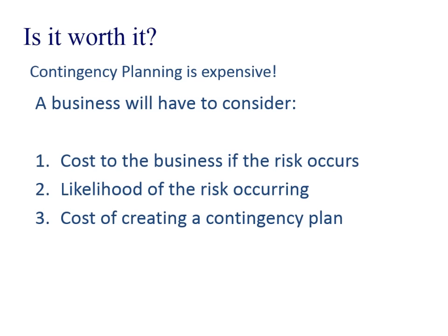So one thing that you have to think about is, is it worth it? A contingency plan is going to be expensive to put together, and it's going to be time consuming. So think about, if this risk does occur, will it be that damaging? Because if it's going to cost more to make a contingency plan, then maybe you're not going to want to do it. You also want to look at the likelihood of the risk occurring.